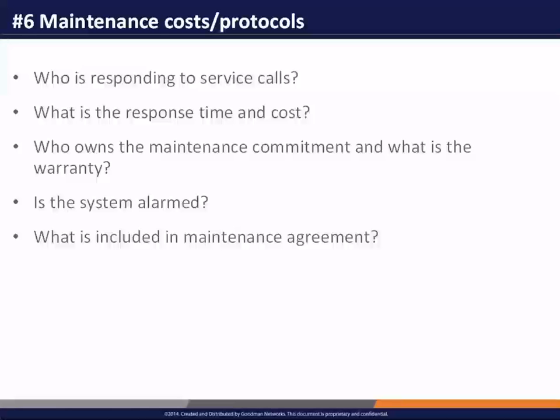So you want to be cautious of a situation where you have a building or a facility on campus where it's critical that the system be up, and when you have an issue, that it get fixed. Well, it's tough if you don't have a spare parts kit on site, because some of these parts can easily take 4 to 6 weeks to procure. Our suggestion always is really to plan for spare parts, and if that's your responsibility, is there a place for those spare parts on your campus? How are you going to handle the spare parts piece of the maintenance agreement?